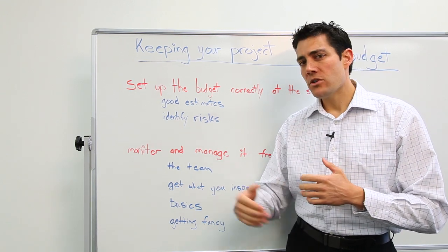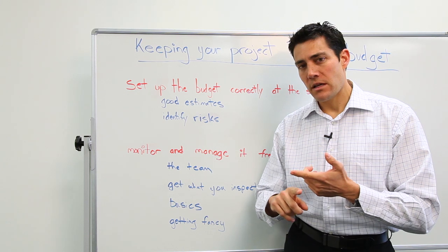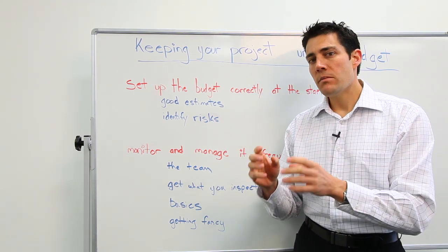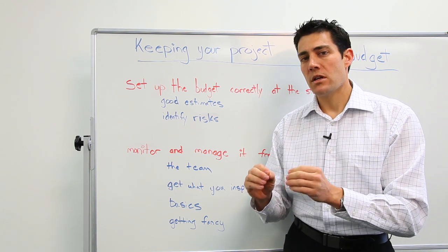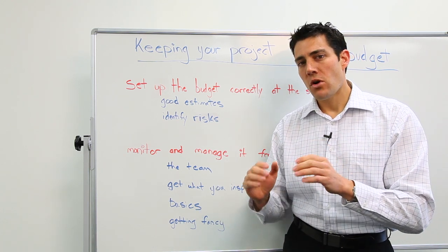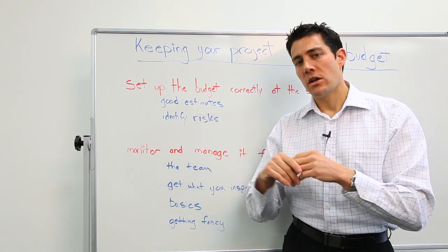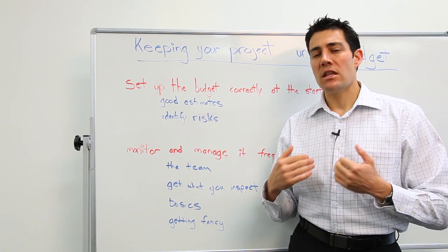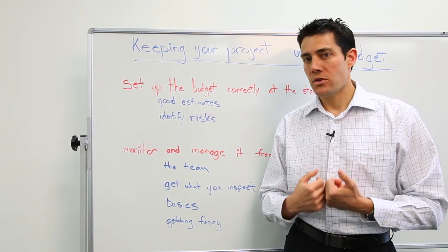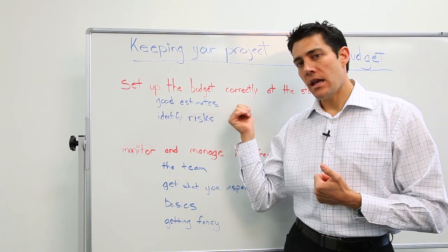So after you finish your initiation phase, get your feasibility study done and your business case approved, then you can be a little bit more precise on what that project's going to be and start to apportion off the total project budget for executing on that project and the contingency that you're going to hold yourself as management reserve. Good estimates are the key to that.